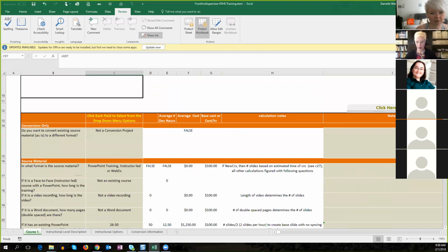Yeah, and being an individual, I've gone a few different ways with audio, and I've landed personally on this: I do not want to make any money on audio. Normally I will do the audio myself if the client is okay with that, and I factor that in. But if they want someone else to do the audio, I find them the person, and they invoice the client directly. That way I'm not on the hook for any fees. That's one thing I've found, being an individual: I really don't like being on the hook for any fees if possible.